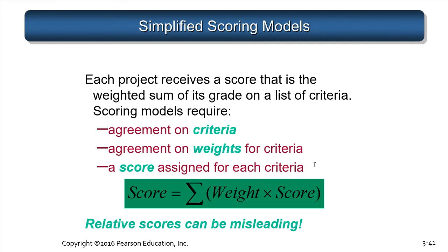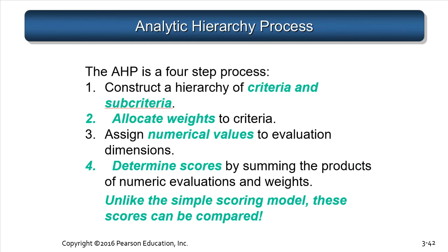For example, you have certain criteria, such as market share, financial return, ability to satisfy your largest customer, and some of those criteria could be weighted higher than others. So your overall score, with this sideways M here, that's sigma for summation, is really the sum of the weight multiplied times the score of each. We'll do some of these when we review when we're together. This is a weighted scoring system, and the highest weight wins.